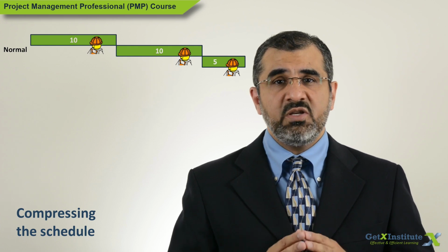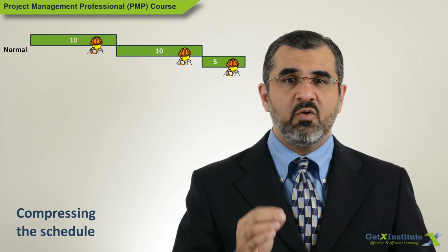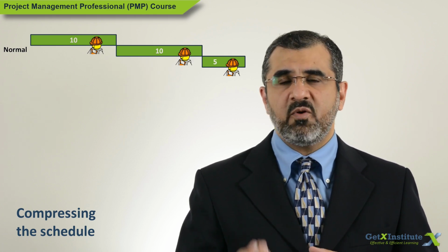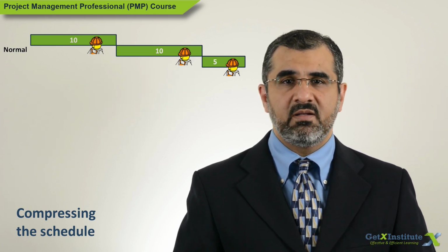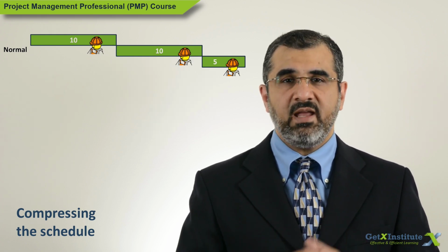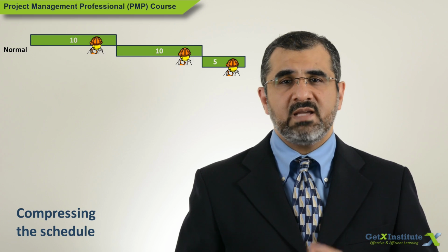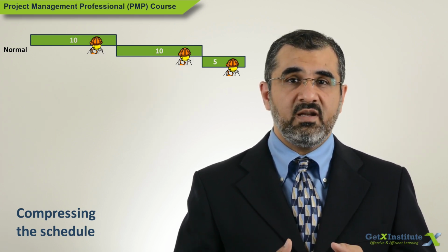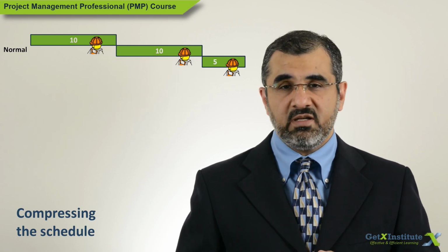The schedule can be shortened by reducing the scope of the project. But what if that is not possible or acceptable? In such a case, schedule compression techniques can help. Schedule compression is a way to shorten the schedule and get the work done earlier, but without cutting down any scope.